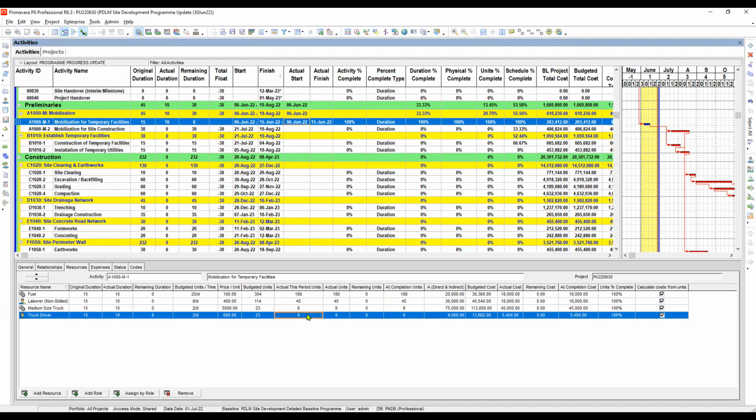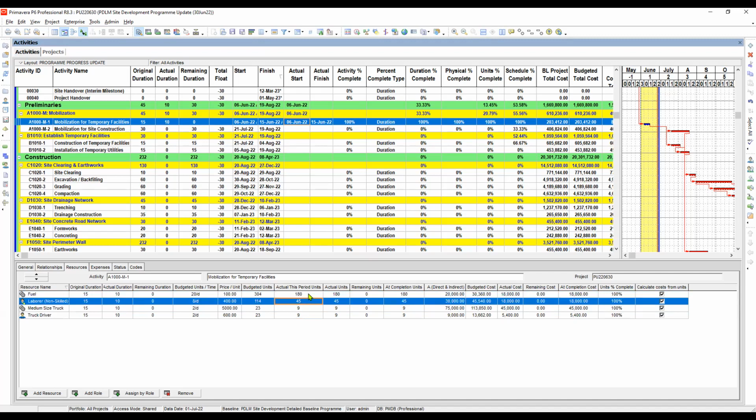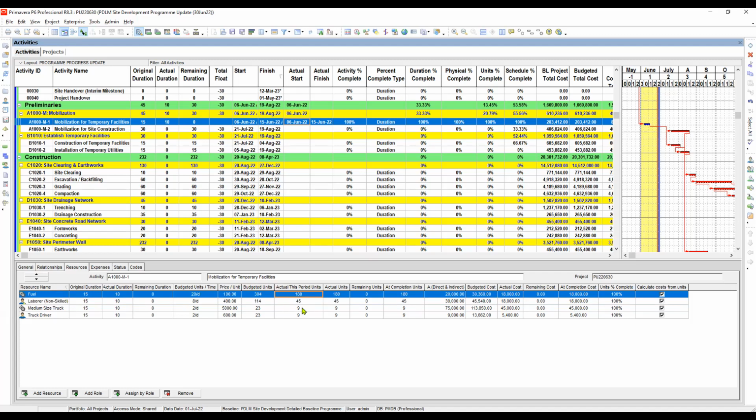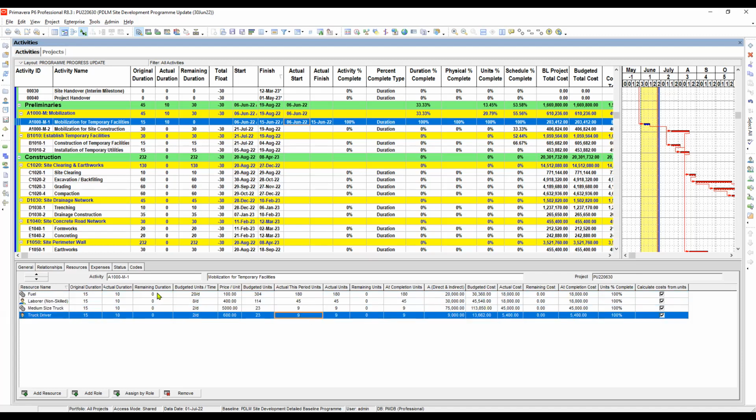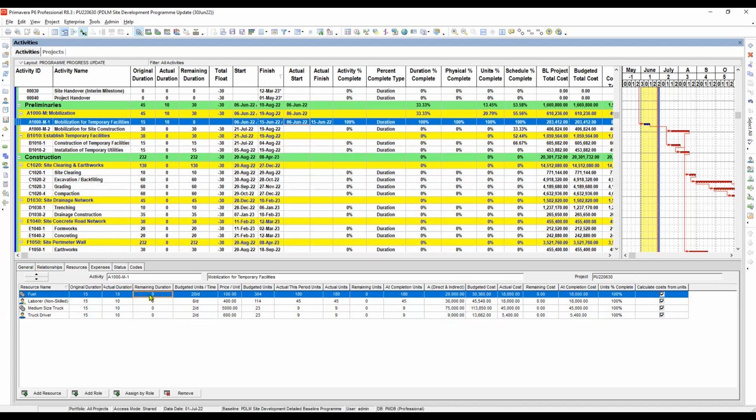Remember that if the activity is not yet completed, or is still in progress, you have to check and estimate the remaining duration, so that you have an estimate to complete cost, and therefore a more or less accurate at completion cost.